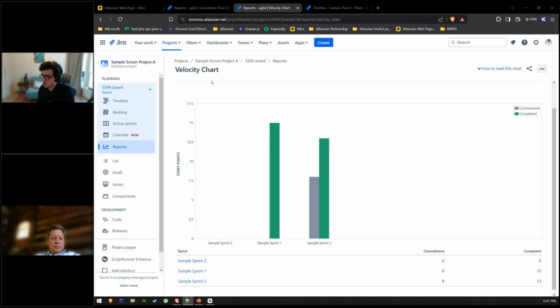There are some documents online also posted by Atlassian on why you should use story points instead of hours or days. However, this is a very long discussion. With story points, I'm just going to tell you that usually, and this is not mandatory, people use Fibonacci numbers as estimates of work. So you have one story point, or two, or three, or five, or eight, or 13.